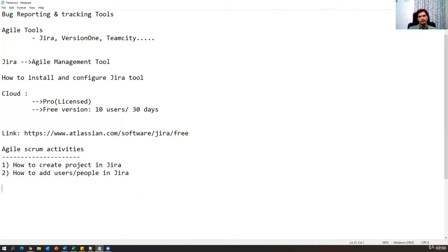So in the Scrum, where exactly will we start? First we need to start with the backlog. So we need to have a product backlog. Then we will have stories in the backlog. We have to create epics, and first we need to have a backlog, right? So in the backlog, we will have epics, and each epic is having multiple stories. Okay, each epic is having stories.